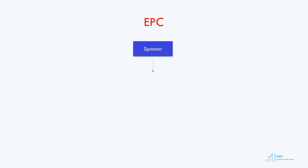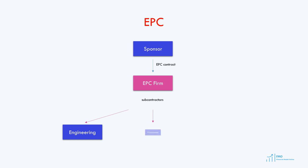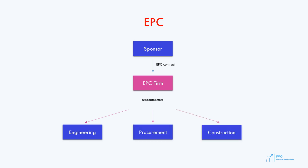In the EPC structure, the sponsor enters into the EPC contract with the EPC firm, and the EPC firm then enters into construction contracts with subcontractors that carry out engineering, procurement, and construction. It is not just one firm carrying out the whole construction process — numerous firms are involved, and the EPC firm ensures full integration of construction activities. The main advantage of the EPC contract is a single point of responsibility. If there is a problem with construction, it will be the responsibility of the EPC firm. Let's review the main terms of the EPC contract now.